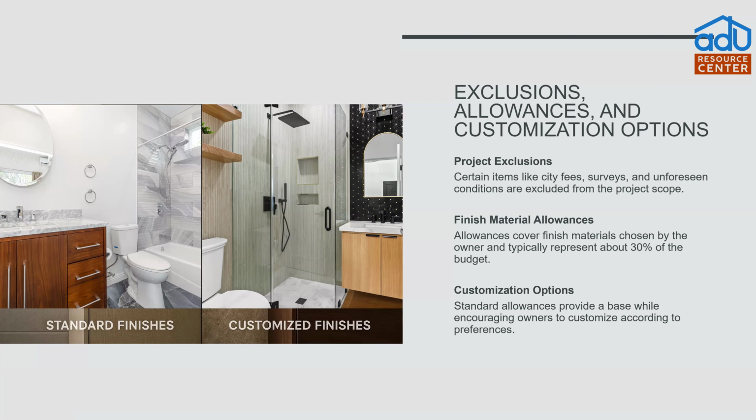City fees, your city fees that you'll end up paying, your permit fee, that is something that you pay to the city. And sometimes it works out that the contractor ends up pulling the permit and they'll show you exactly what the permit cost is. And then you pay the contractor back for the permit fee. You're not going to pay a premium on that. It's going to be exactly whatever the city charges.